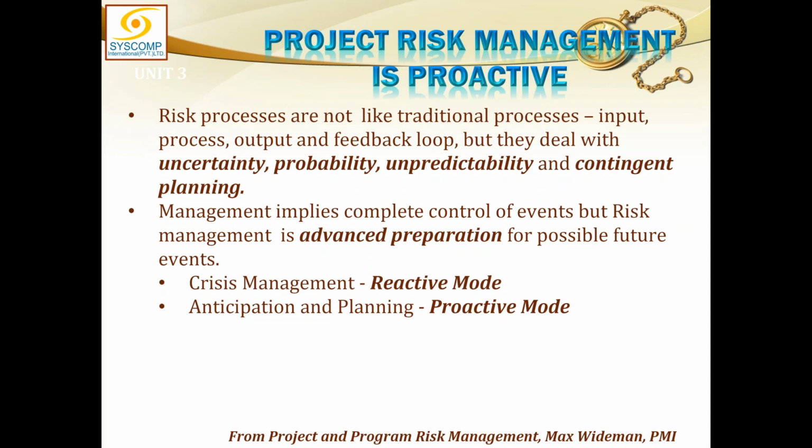If I have to construct a wall, then I have to have bricks. I have to make the mortar to hold the bricks. So these are things which I have to do, and I am 100% sure that I will definitely have to do. These are not risks; these are activities. So anything which I am sure and I have 100% probability of doing that thing, that cannot be a risk. That is a fact. That can be turned into an activity.